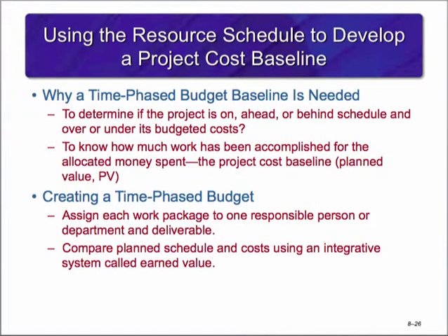Creating a time-phased budget baseline is necessary to determine if the project is on, ahead, or behind schedule and over or under its budgeted costs. It helps the project manager to know how much work has been accomplished for the allocated money spent, the project cost baseline. To create a time-based budget, you will assign each work package to one responsible person or department and deliverable. You then compare the planned schedule and costs using an integrative system called earned value.